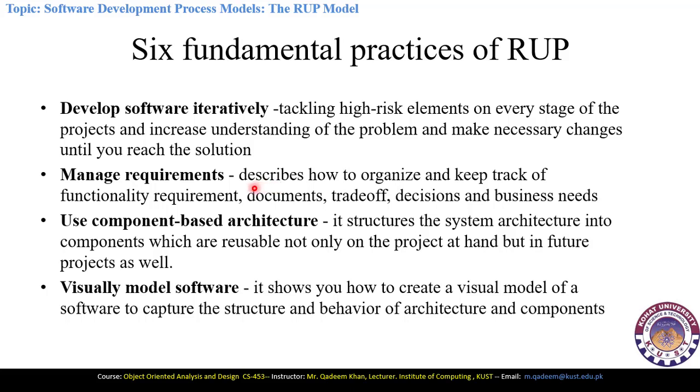So managing the requirements describes the full organizing of the requirements, and also keeping track of the functional requirements, the documentation, the trade-off between different requirements, and also the decisions and the business needs here. The trade-off means that when there is in fact a choice between two or more requirements, then we will identify the trade-off. It means that if one requirement is much more important than another, first we will develop that particular requirement there.